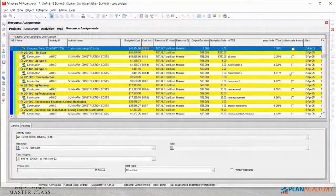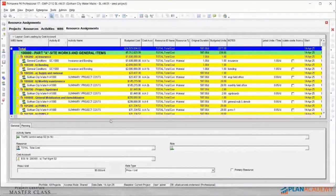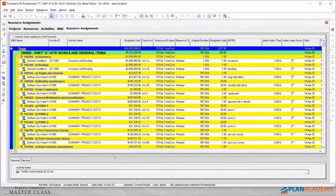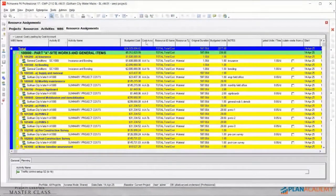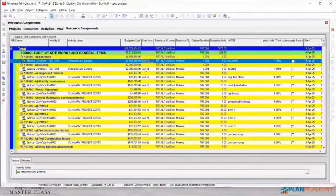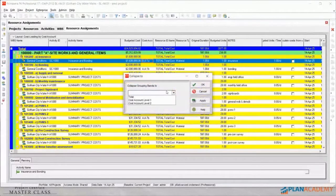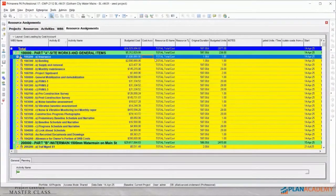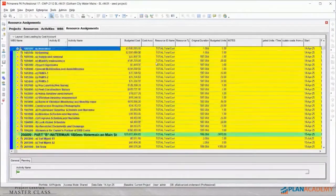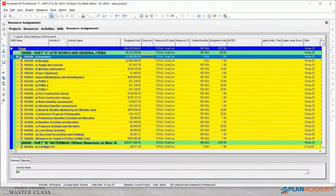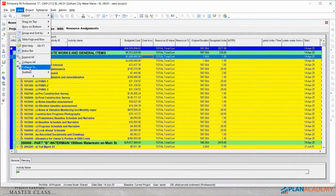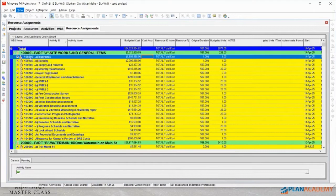So, resource assignments. Number one, I created a special view — a special layout basically for the kind of work that I'm doing. This is where the cost accounts come into play in a major way. I've grouped all of the assignments by cost account — here's my cost account column here. When you collapse this to cost account level two, you basically get the exact same breakdown that matches your Excel spreadsheet. These are exactly the same costs, the same totals from the Excel spreadsheet, so that becomes invaluable to you. All you do is group this by cost account.